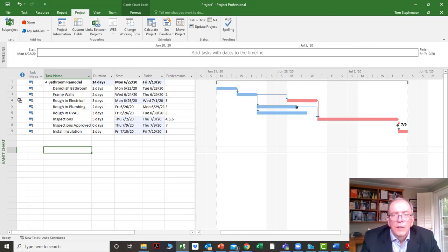standard calendar. Some of the problems or issues you may find when you add standard calendars, it kind of changes the properties of the critical path, which sometimes can confuse the program a little bit. Like it won't show that these two are critical activities when really they still are, because this is locked in as a start date. It's locked out of the Friday. So sometimes there's some nuances. We'll talk about that a little bit more when we get into the critical path aspect of scheduling. But really the critical path is following through these activities through here and through there.